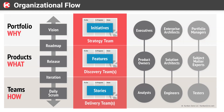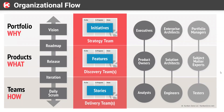On the left side, we also have the five levels of planning in agile: you should have a vision, a roadmap, you will most likely conduct a release planning session, and if you're doing Scrum or Kanban you'll have the concept of iteration — optional in Kanban but can be mimicked — and every day you'll have the daily scrum. These five levels of planning go across your organization in parallel to your three boards. Using a minimum of three connected Kanban boards is what you would do across the organization.